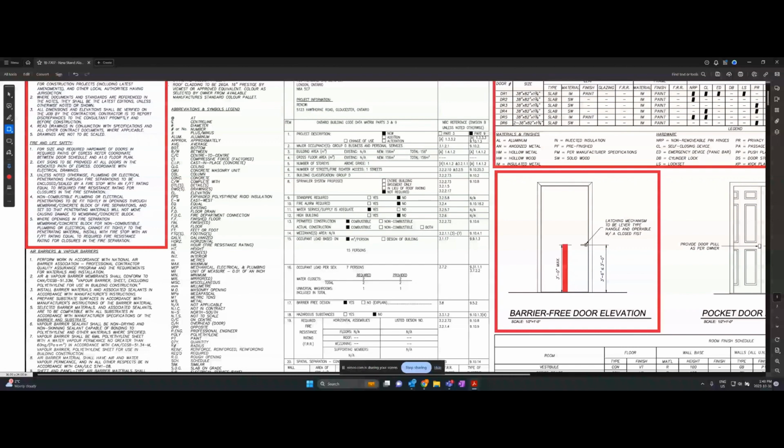If you've never done any of that before, please let your project manager know. They will help you with that. Basically, the short version is that there are systems online that you can just click through with Hilti. They even have an app, and you can go on there and decipher which system works for your area. You can print out a number, and then we can provide it to the building inspector when he or she comes to verify everything.